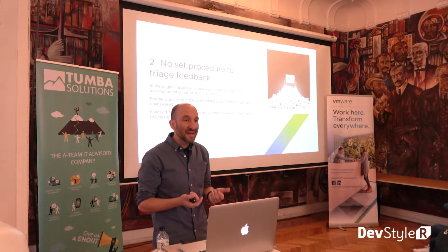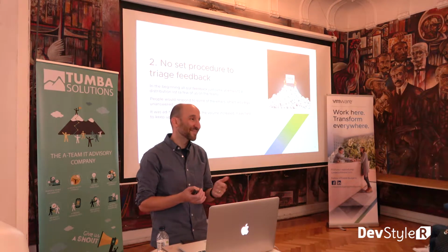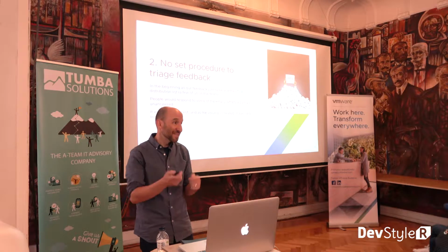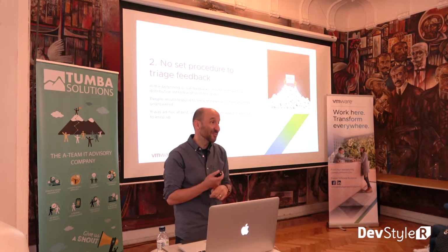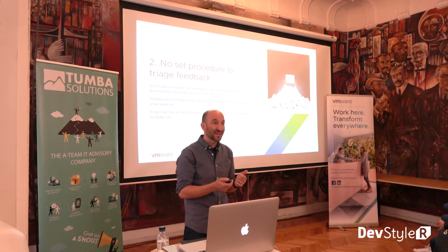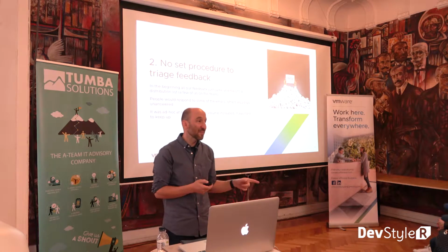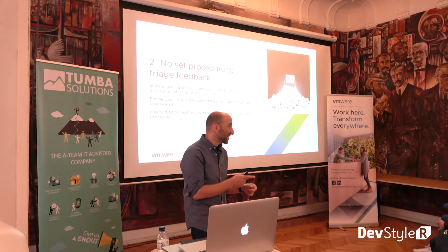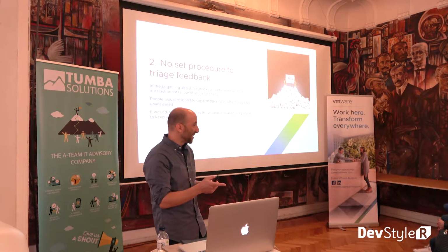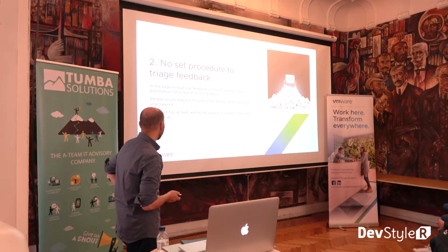Because when you get feedback, some of it's like, hey, I really would like the button on the left. Can you move this button? Can you change the label? And then you get some other ones like, my mail doesn't sync at all with this mail server. You guys should check Exchange 2013 because it doesn't seem to be working. The problem is, if you're not triaging it correctly, you pay attention to the first one and go, well, I guess maybe we got to have a discussion about moving that button and renaming it, instead of, uh-oh, we got a real problem. Like if we ship this, we're going to be working the weekend and nights and so on, and we better get some sleeping bags for the office.